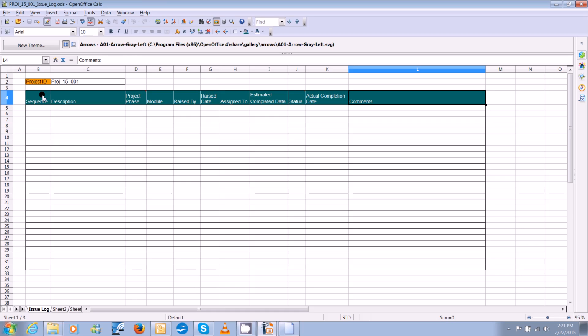And the moment an issue is raised which has impact to time, budget, and the plan, or the resource, you have to capture those things and make sure you track them and assign the right resources who should finish it up, and of course follow up with him or her to make sure that these are being addressed. And as I said, all the statuses have to be closed before we do the production migration.